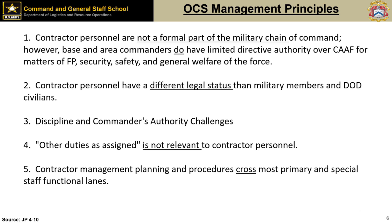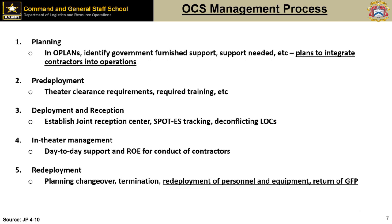Not that, but the one, how are you going to account for them; the three, which interpreters do you need; and the two, what do you need interpreted. Do you need translators too, or do you just need interpreters? Do you need written? Do you need spoken? Everybody's got to provide some input here. The four, where are they going to live? Who's going to feed them? How much is that going to cost? Just ask everybody. Don't leave it to one person to do.